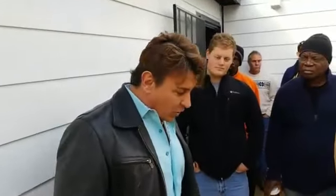Now, Tony just wrote in, and he was the one asking about permitting earlier. He says, for the proposed plan, kind of what we're talking about now, do you have to have the correct dimensions for approval? What if you want to change during the process and change your plans up a little bit? I think that's what he's asking. How much flexibility do you have? Okay, first of all, you draw up your existing plans, and then you have your proposed plans. So, Tony, don't change it, man. Make sure you know what you want when you submit it, because then you have to go through that permit process all over again. Who wants to do that? That could get a little expensive and time consuming.